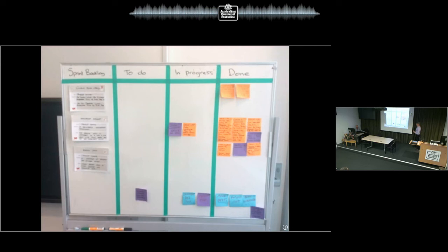So Scrum sort of uses a Kanban board. So you see this flow of to-do, in progress, and done. There isn't a WIP limit here because we're limited by working by the time box. So this sprint would be 2 weeks long, and we know that these three stories we aim to finish by the end of the sprint. So this is a very stock standard first team, first sprint. This is how it would look.